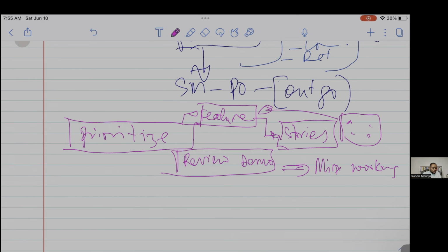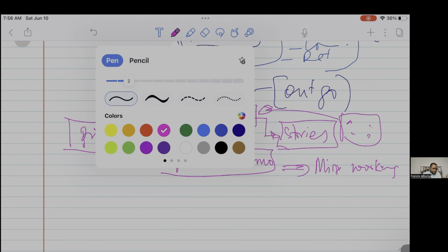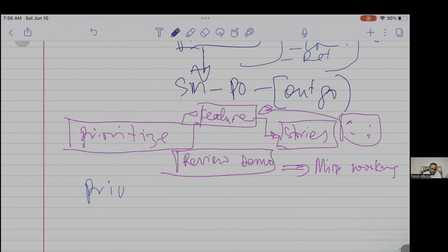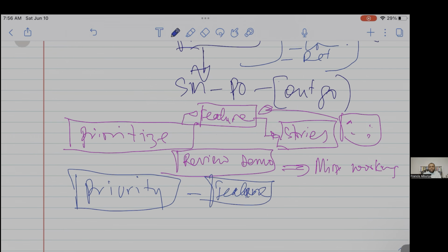Now we're looking at what? Let me try to refocus here. We're looking at prioritization. You want to prioritize what's priority for the customer, and this priority comes into features, and this feature is prioritized based on how the customer plans to launch their business. There's one thing that must come after another, after another. Let's say you want to start a chain of restaurant business. What's going to happen? We should plan to expand them. There's one thing you need first, then start adding it up, right? You cannot start by investing all your money in getting a very sophisticated payment system and review system when you don't even have the furniture to put in the restaurant. So this is exactly how digital product works.